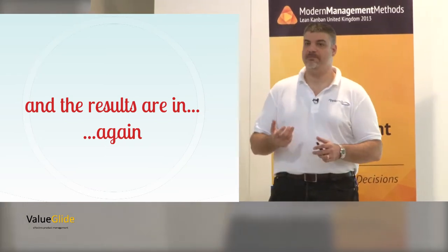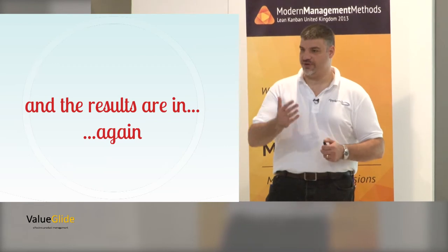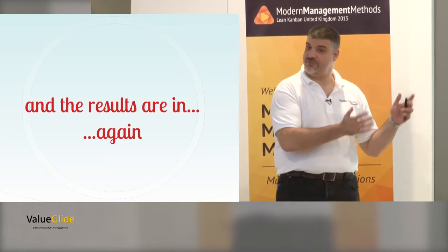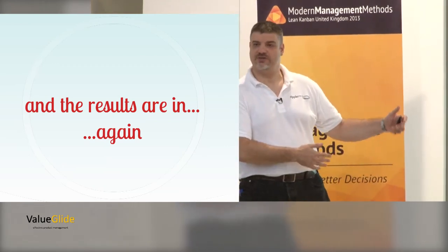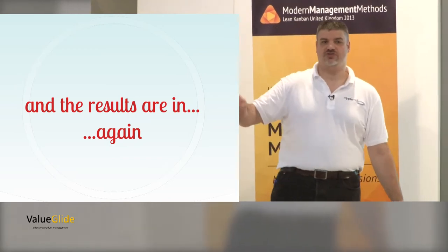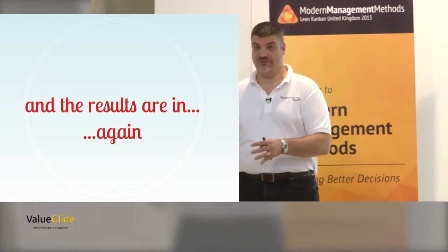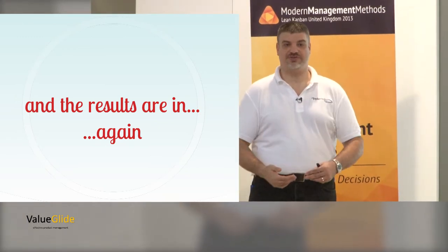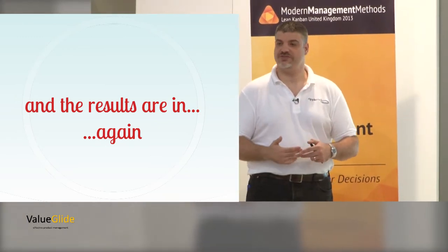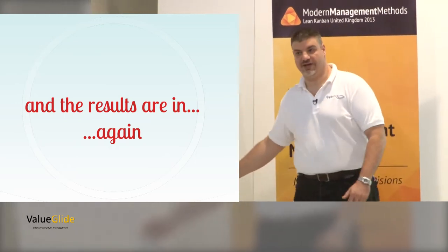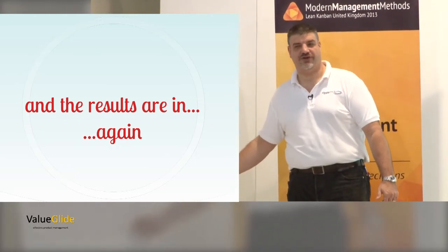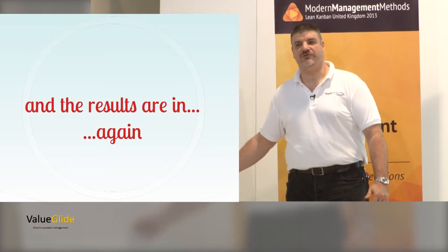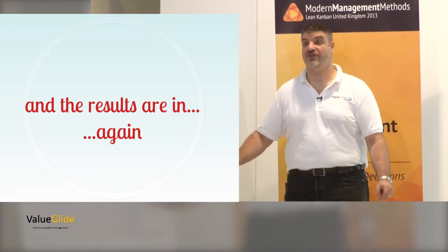And this is, again, a Kanban learning we can take. We talk about that initial commit point at the start of lead time, if you remember David Anderson's keynote this morning. And that's a two-way commit. It's not just a commit of, we're going to do your stuff now that you asked for. It's a, and now you need to commit to work with us and to actually want the thing you've asked for. So it's worth thinking about that and actually making sure the customer's along for the ride. Because it can feel really weird when 22 seconds in, nothing's happened.